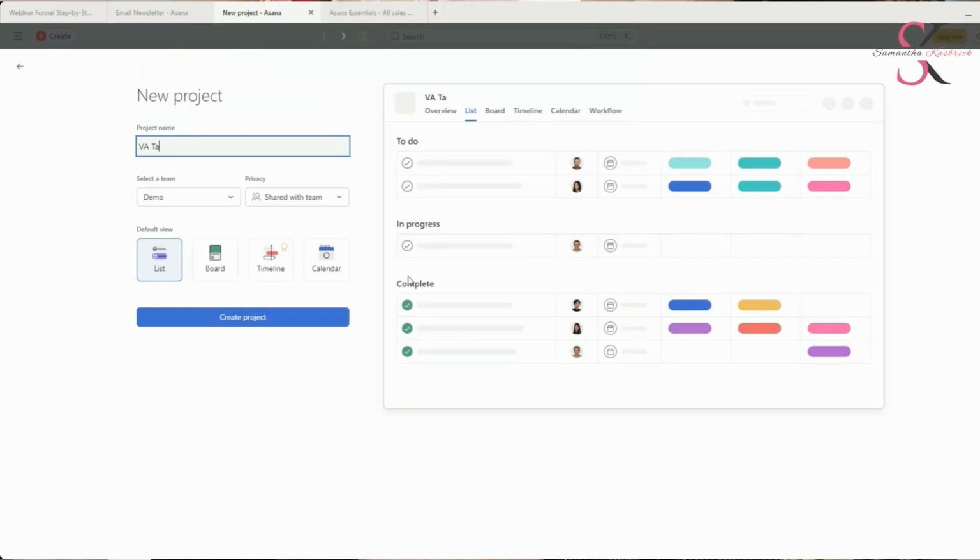So let's say you're a freelance web designer. You get an inquiry, Honeybook sends your pricing guide and contract, client signs and pays. Now what? You've got 12 weeks of design work to plan and deliver. And that's where Asana steps in. You plug the project into your Asana client work section, assign deadlines, add checklist templates, and assign parts of the project to your VA. You've got the whole thing systemized and you're not reinventing the wheel every time someone books.